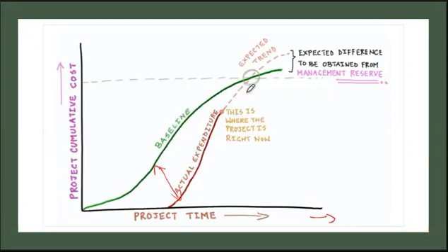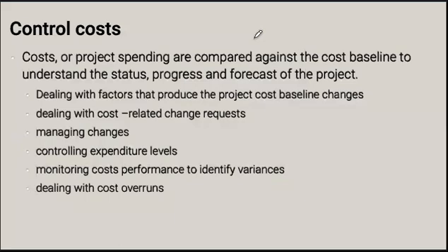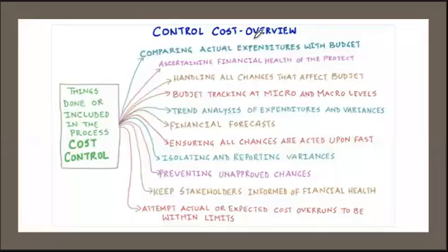Anytime we are below the baseline is good from the point of view of cost performance, but if our forecasting indicates that we are going to exceed the baseline before the end of the project, we are going to be in a little bit of trouble. So using this cost baseline S-curve is a useful tool that we can apply for cost control. Once we're through the process of determining the budget, we can start getting after controlling the costs.